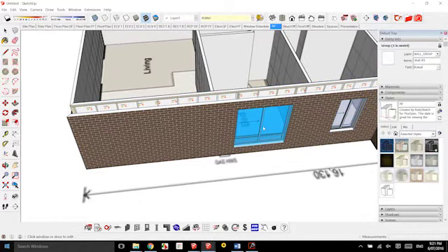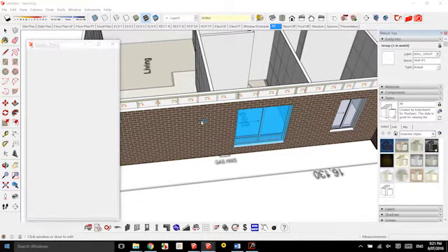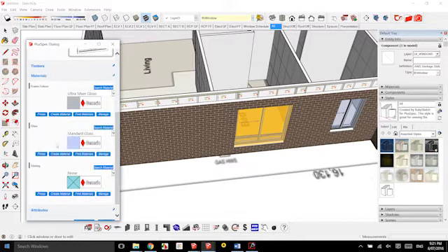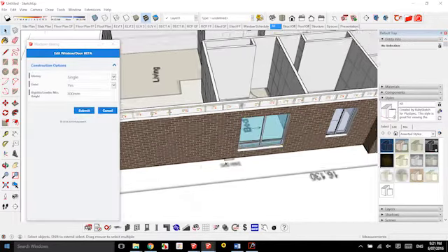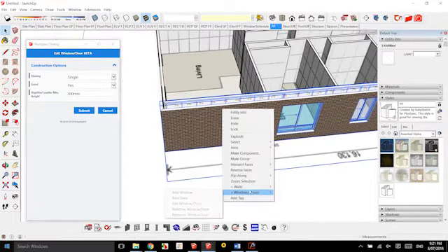Everything that Grant put in there, it actually put in the lintel above it. You don't need to know it, we already figured it out. We knew what the span of the lintel was, how far it would actually span, and therefore when you put in a window it'll put in an angle if it's over a certain height. If it's under a certain height it'll put in a flat bar. It all comes out in the takeoff at the end of the day.